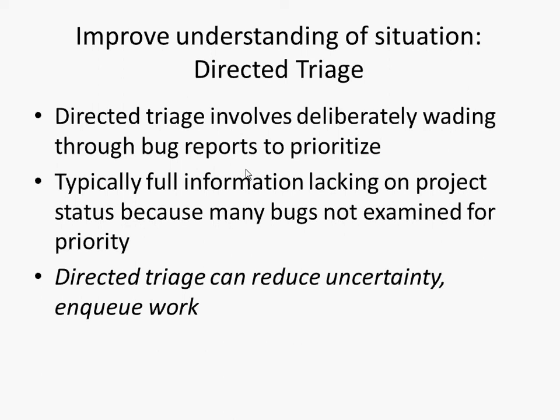Do we have all level 3 issues, sort of low priority issues, and we're in pretty good shape, or are we dealing with situations where we have 10 level 1 issues, high priority issues that require fixing, in which case we've got a lot of work to do just to fix those bugs, and we should hold off on any of these new features. The client would be better off with us just fixing the bugs as they are rather than adding new features.